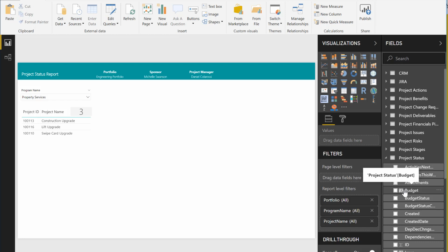When you load up the image, it needs to have the same name as what's in the drop-down list for your red, amber, green statuses, which in our case are red, amber, green, and NA, where you haven't added a value. So then, where you've actually recorded the statuses red, amber, green, it knows to go and select the appropriate image.